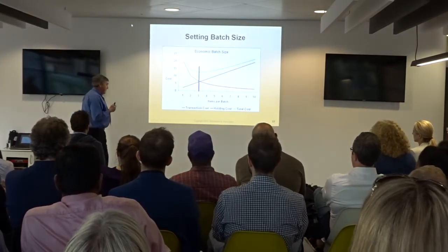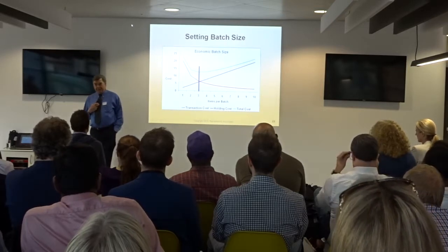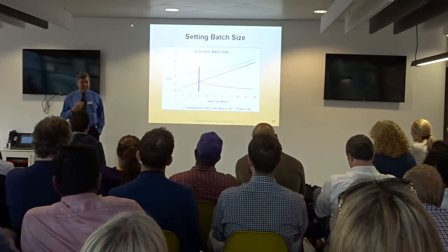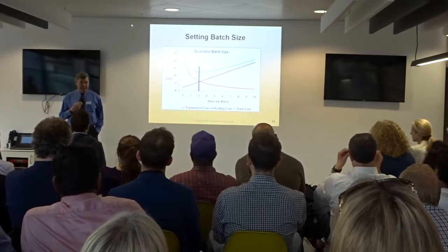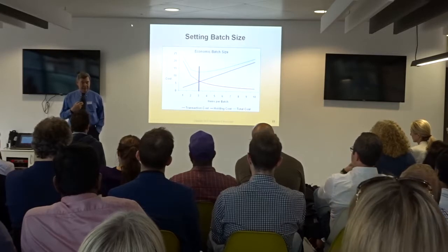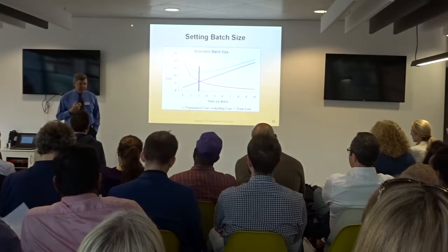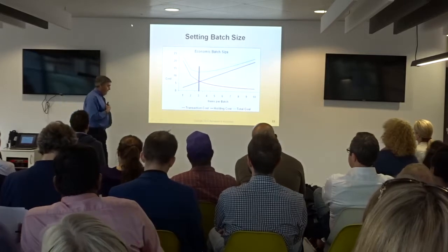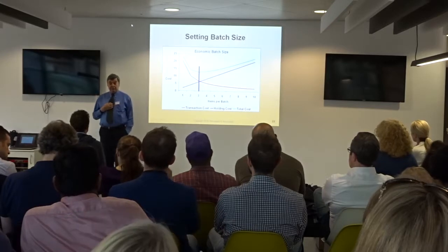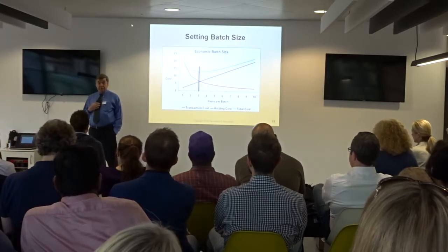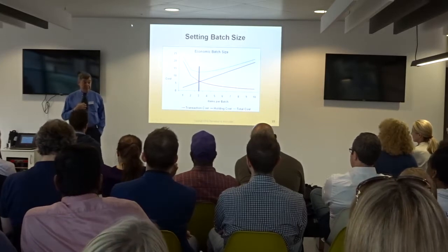Batch size is actually a quantifiable issue. The slogan that they use in lean manufacturing is lot size 1 is the perfect answer, so don't even think about it. The economic lot size equation is actually the way you calculate the correct batch size. And it was originally written up in 1913, so it's only 104 years old. It's not really new technology that I'm talking about.